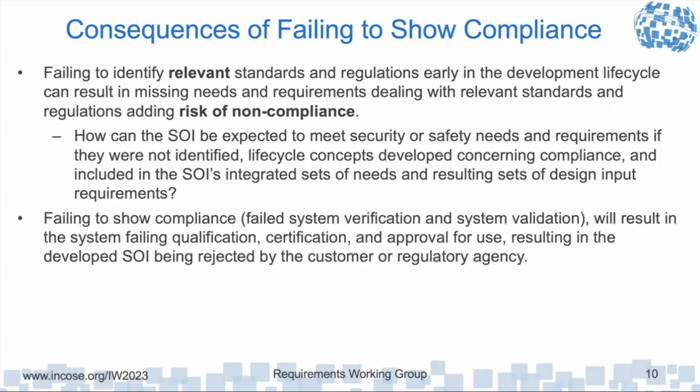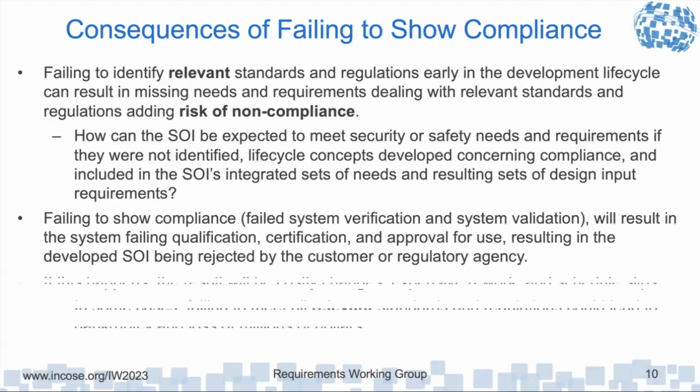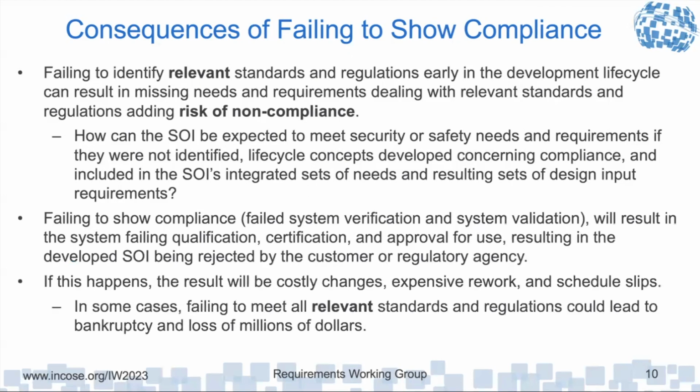Failing to show compliance, and failed system verification and system validation, is going to result in the system failing qualification, certification, and approval for use, resulting in the developed system of interest being rejected. If this happens, it could be very costly and result in expensive rework and schedule slips. In some cases, it could lead to bankruptcy and loss of millions of dollars for a company. This is one problem I've seen in some startup companies.